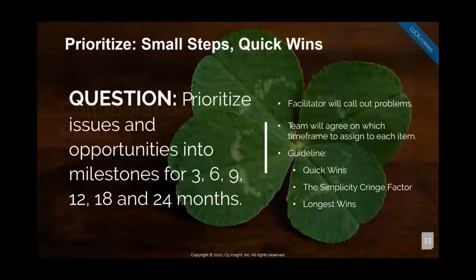So now you've got the raw material feedback, you've brought it to the leadership team, and generally you say, okay, let's now prioritize all these different things. So you might put dates across the top. We like to do that to say, realistically, do you think you can get this done in 3, 6, 9, however many months? Now, some people say, how about we say phase 1, 2, 3, 4, 5 or something like that, because we don't know enough about these things to know.